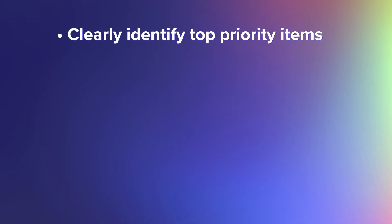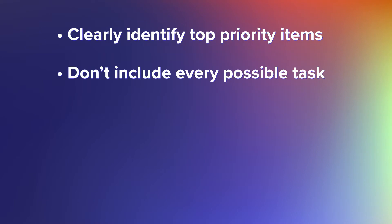Here's how to make sure your Product Backlog sets you up for successful sprint planning. Clearly identify top priority items and make sure they're scheduled to begin in your next sprint. Don't include every possible task related to your project in the backlog — this takes the focus away from higher priority tasks. Every item listed in the backlog should add value to the product.